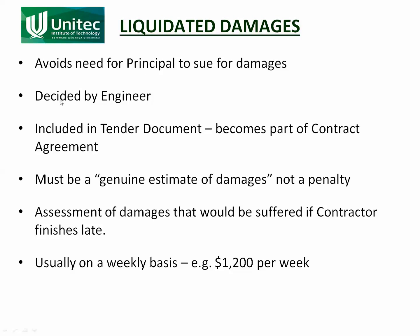It's decided by the engineer — the engineer is the person that decides whether liquidated damages are applied or not. It's included in the tender document, so part of the contract agreement is that the contractor agrees to pay liquidated damages.